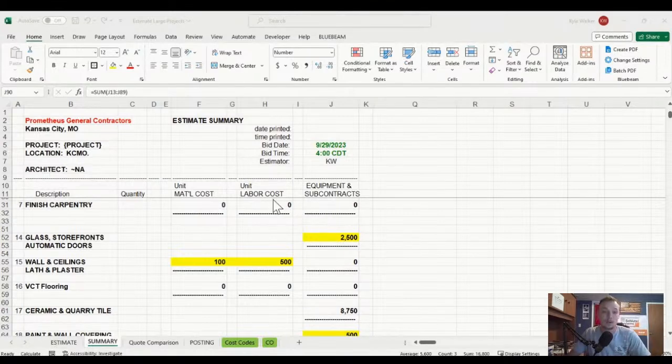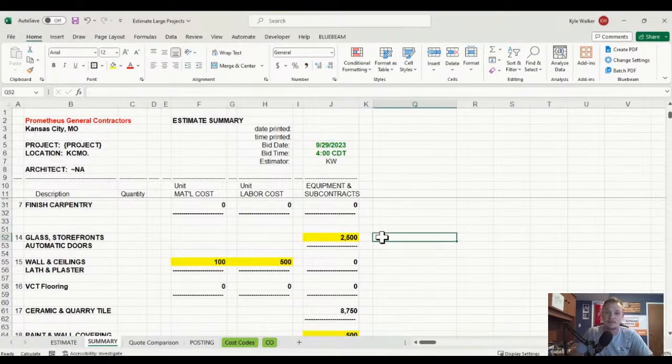Yours likely will not look like this, but it gives you an idea of some of the scopes and how we as contractors break things down. Most of the time you will not get it as broken down as this. You'll get a cost, but you need to make sure that your project scope agreement, your PSA, your scope of work, or your description of work, is where the money is, for lack of a better term.